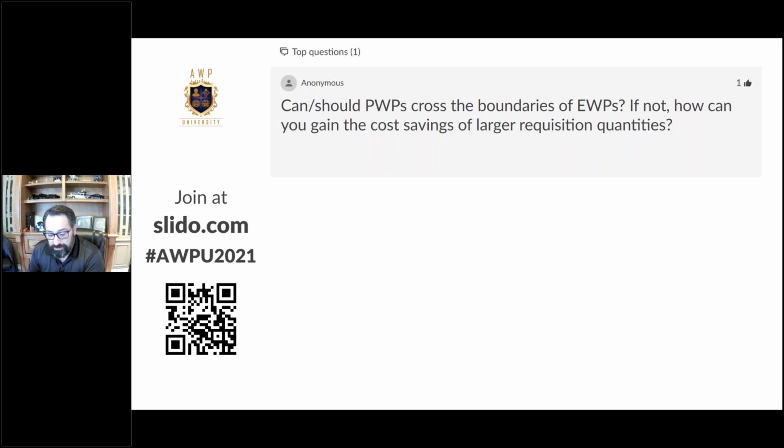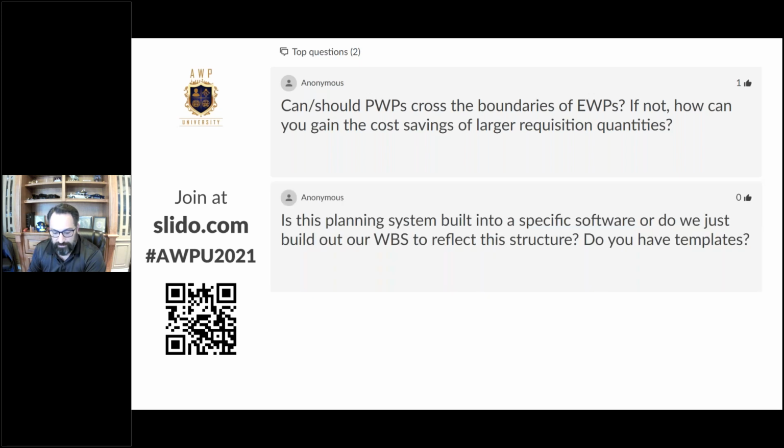Very good question, and often they will. Especially when we're talking about bulks. Certain things, like when you talk about the most common valve on just about every project, 6-inch carbon steel, that's a standard valve across multiple projects. You're going to do bulk orders, but that PO for that order will be called out across multiple PWPs or one PWP towards multiple EWPs.